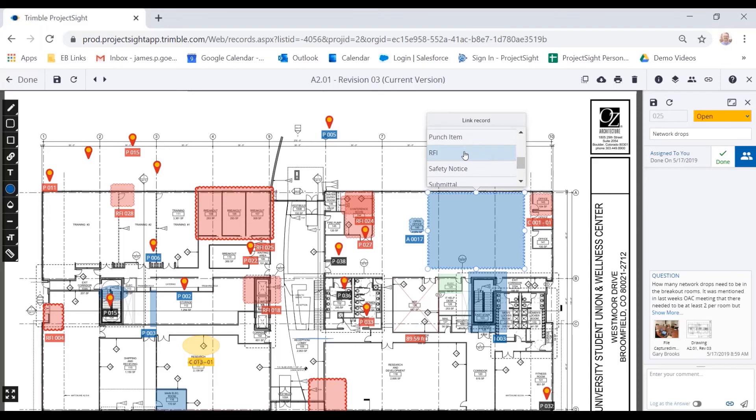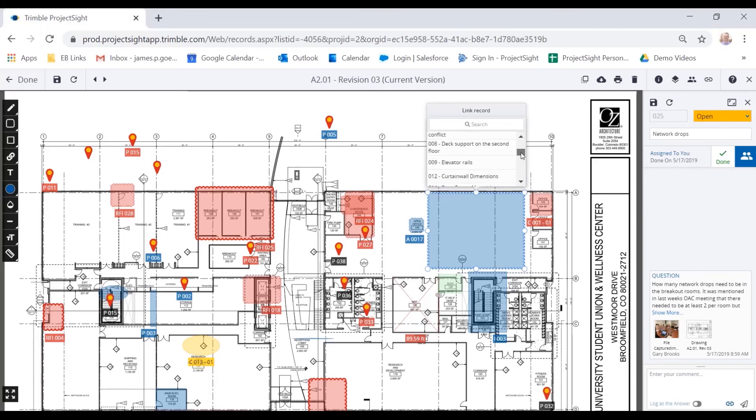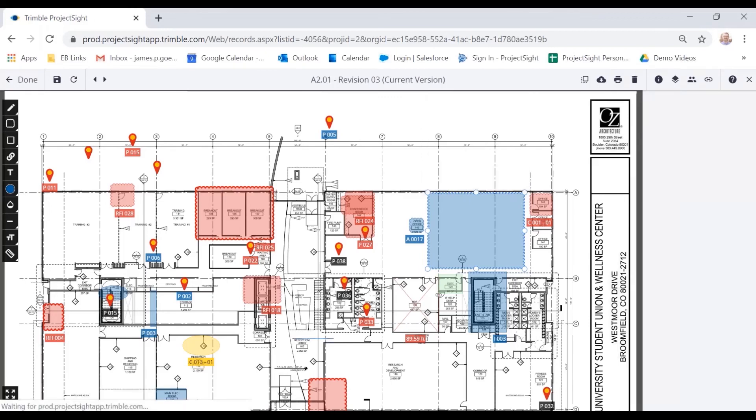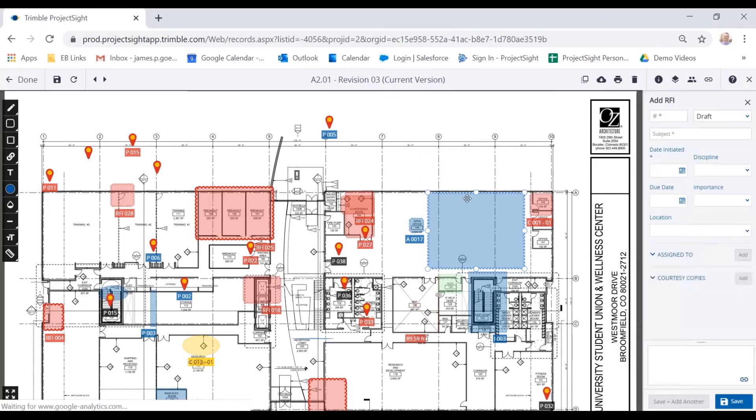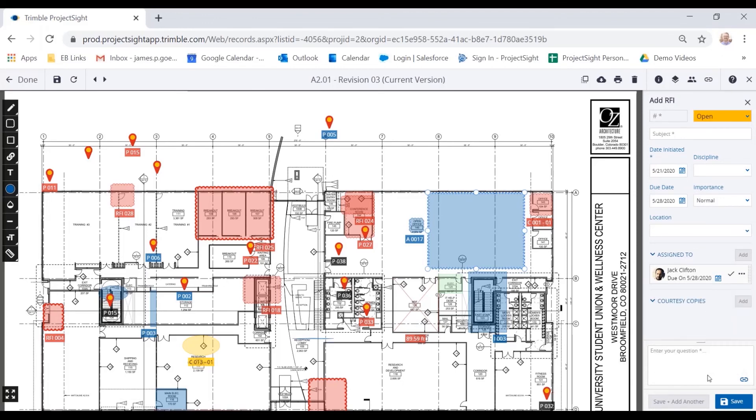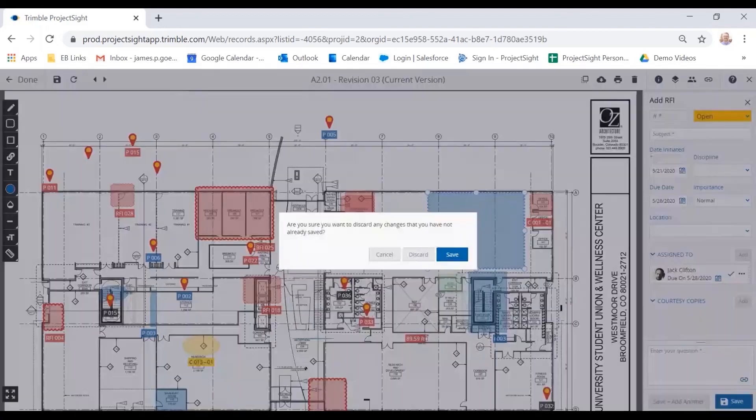So in this case, it's just an RFI. I want to create a new one, or I can use an existing one that I have in the system. If I created one today, off of the drawing set, in a different process, then I could link to it here within the drawing set. Or I can just create a new one, it'll pop out on the right side, I'll complete my form, I'll submit that, make any other links I need necessary. And that RFI would then be submitted to the RFI log.